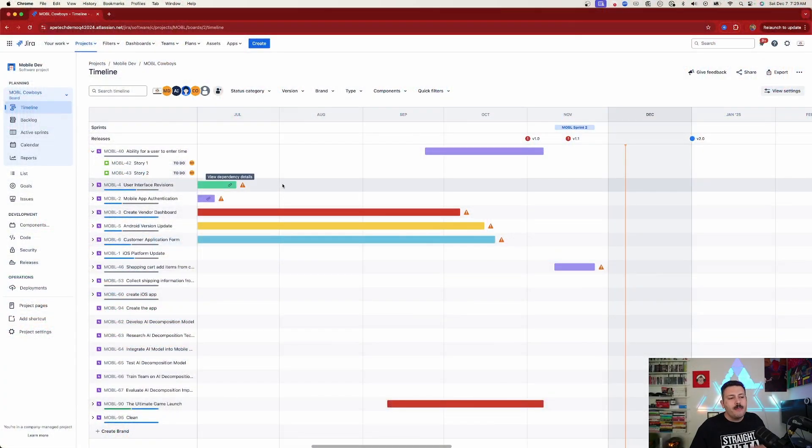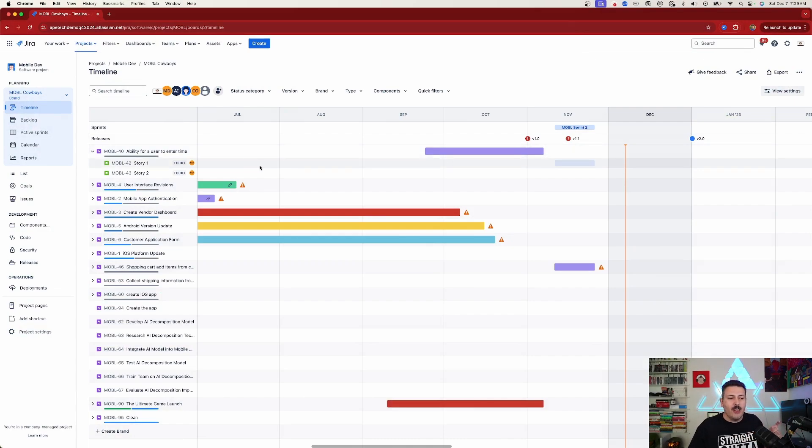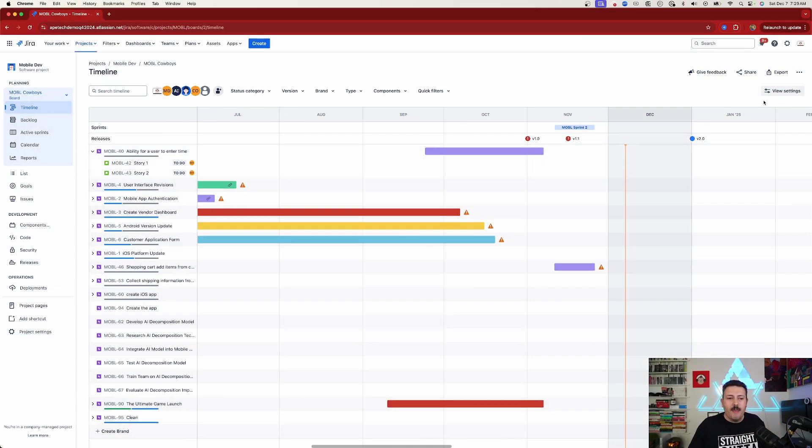As long as you can live with that restriction, keep in mind everybody gets this one — this is the basic roadmap. You're able to put dates on your epics, and you're able to put dates on your stories, tasks, and bugs.